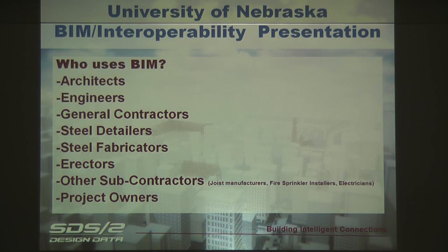Other things here in Omaha, there's a couple of fire sprinkler installers and fabricators. They want to extract information from this model too, so that they can put all the piping together in their shop before it's sent to the job site. That significantly keeps that cost down, electrical and so on. So that's who benefits from it.